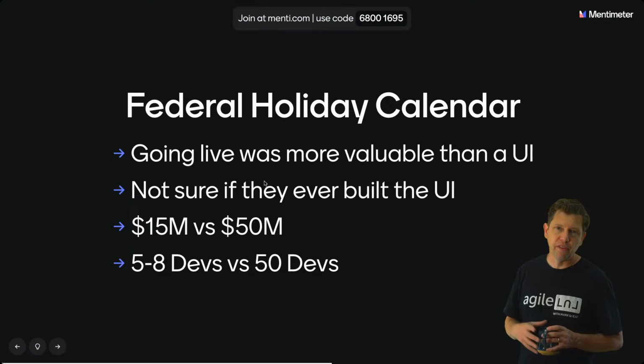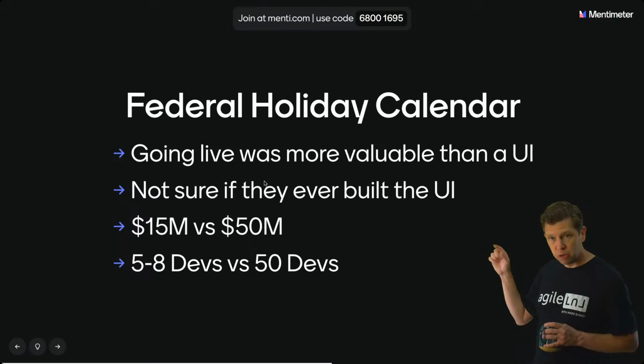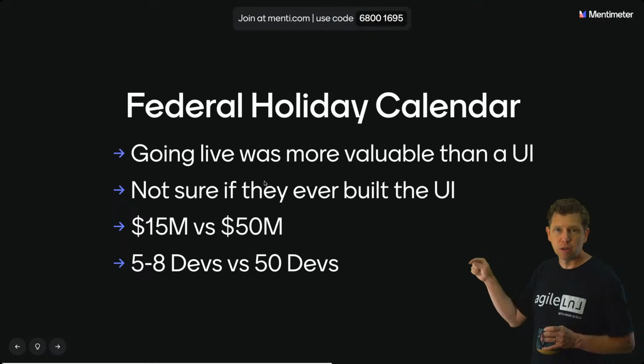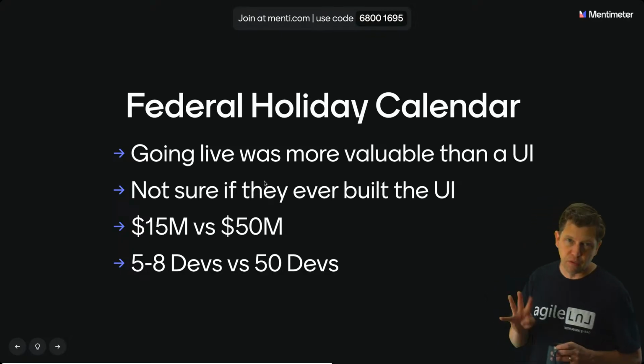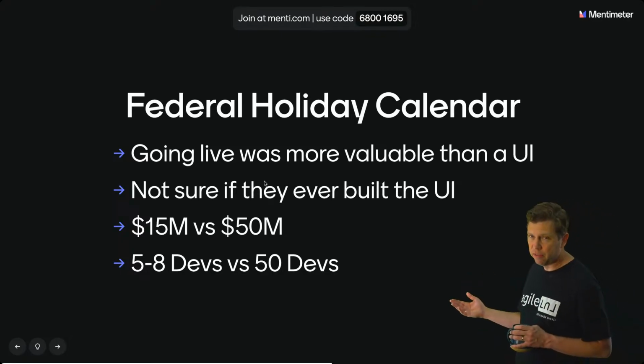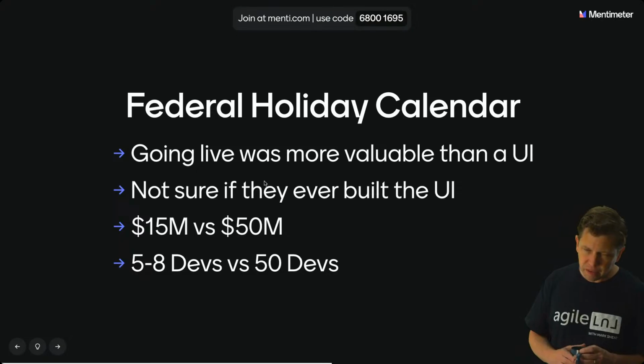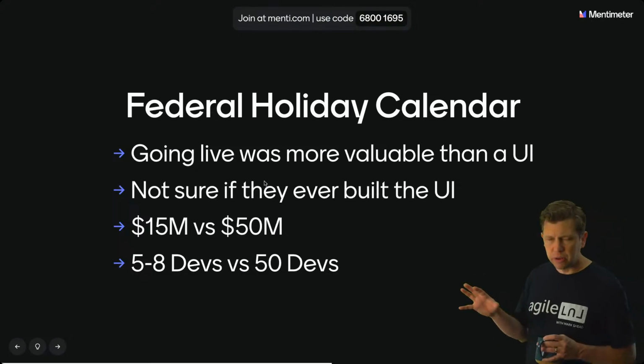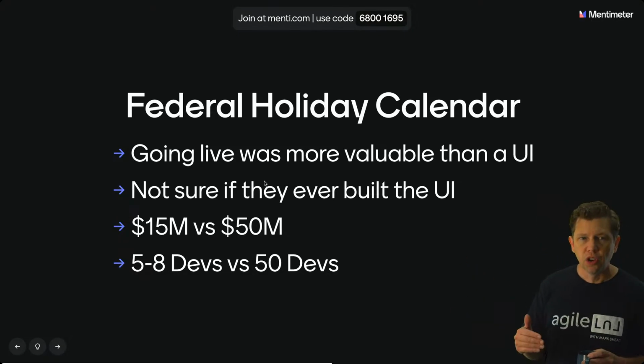We ended up doing it for $15 million because everything was done in this way of really, really being careful and prioritizing what's the next most important piece. They also were able to do it with about 5 to 8 developers in 4 years instead of what would have been projected of 50 developers in 5 years. So the MVP approach can be very valuable as you work through making sure you're working on the next thing and just proving each thing out.